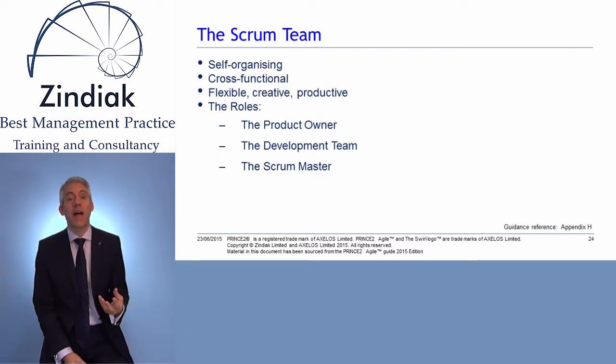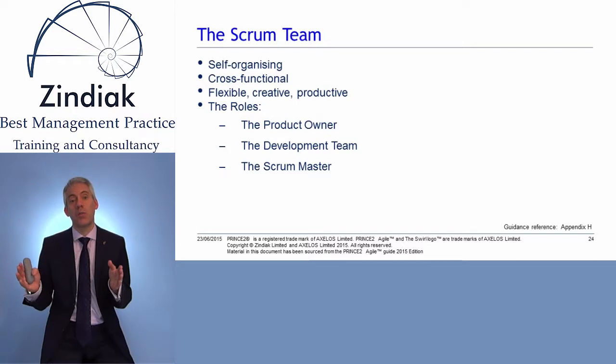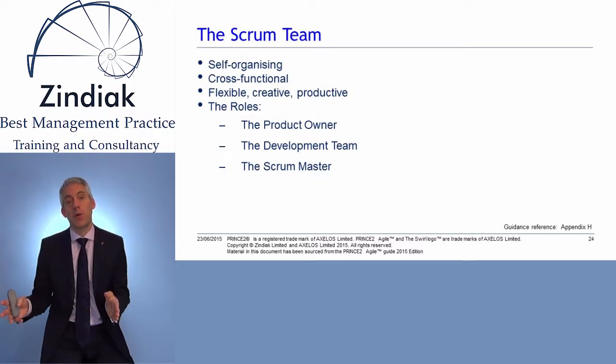So they'll be there to inform the Scrum team of priorities for development. So in the Scrum backlog, if there are 10 items on the Scrum backlog, we've got a fixed time box, sprint. The Scrum team can't necessarily deliver the whole backlog in the sprint. The products need prioritising. It's the role of the product owner to prioritise those items for the Scrum team.